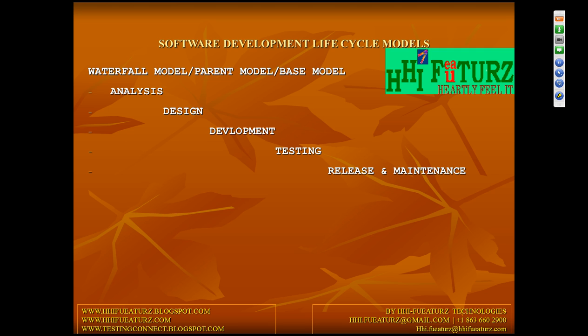Once this task finishes, then only architects come into the picture and they gather requirements from BRS or the business analyst team and come up with high level design and low level design. Architects come up with the complete design of all those requirements. Once design is completed, developers get involved and develop the entire application. Once the entire application implementation is done, they send it to testing for testing purposes.